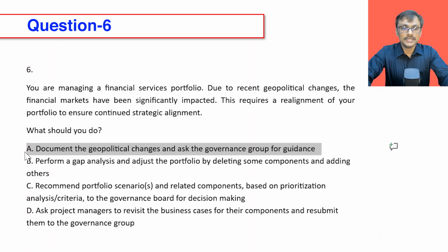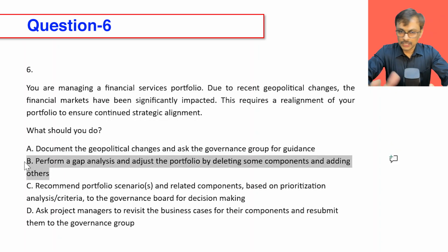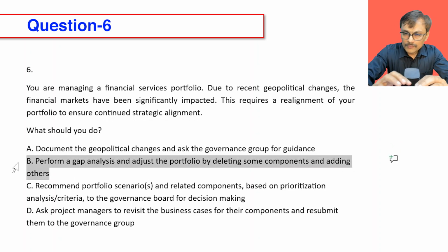So I skip option A. Perform a gap analysis and adjust the portfolio by deleting some components and adding others. It is part of your strategic alignment or managing strategic change, so you can definitely do a gap analysis. But I would be a little careful, and if I don't get any other option, I would probably choose that. I may not be able to decide on adding and deleting on my own. I need to take approval on that in general. That is the only missing piece here, because it is directly saying you fix the portfolio, you are the boss. I may not be.